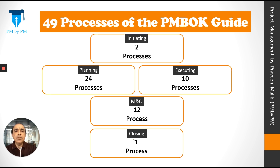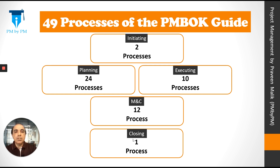These five different heads are called the five process groups of project management: initiating, planning, executing, monitoring and controlling, and closing. Under each process group there are many processes — two in initiating, 24 in planning, 10 in executing, 12 in monitoring and controlling, and closing has only one process.